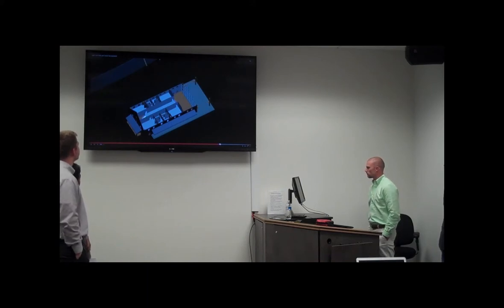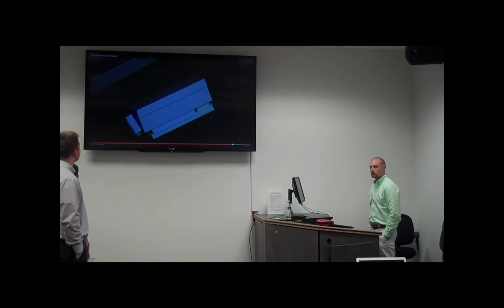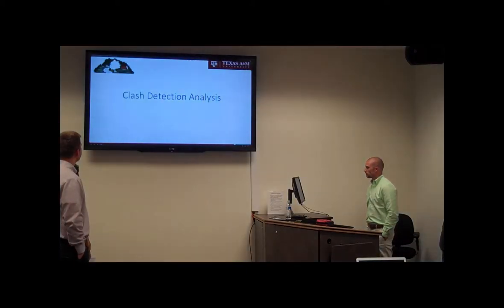After the gypsum boards are placed on the second floor, rafter beams for roofs would be installed, followed by roof frame and asphalt shingles. The same construction methods, materials and sequence would be replicated on the other buildings of the project.